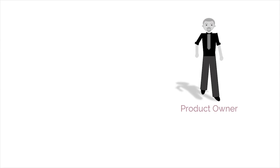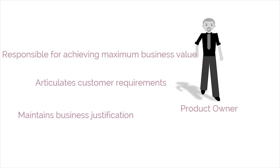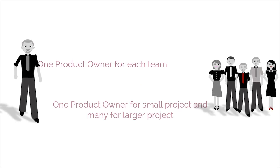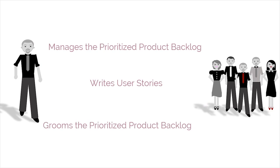Product owner is the first source of input. The product owner is the person responsible for achieving maximum business value for the project. He or she is also responsible for articulating customer requirements and maintaining business justification for the project. The product owner represents the voice of the customer. Each Scrum team will have a designated product owner — a small project may only have one, whereas larger projects may have several. These product owners are responsible for managing their sections of the prioritized product backlog, writing user stories, and grooming the backlog.